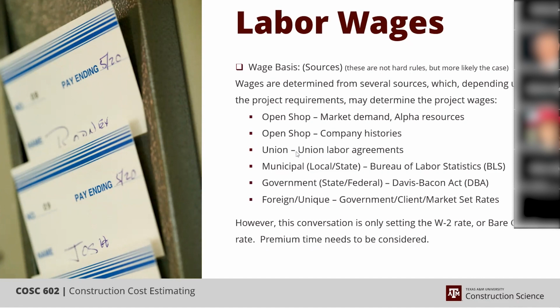And then when you go foreign, you have some really unique jobs. I've seen governments dictate wage rates. I've seen the client itself dictate wage rates, or I've seen the market take over, and it depends on what the market's demanding. So, government will trump the client and the market, and the client can trump the market if they so desire. Particularly if they both are saying something higher. If they're saying something lower, the market tends to overstep them, because you won't be able to get them there if you don't. So everything we've talked about so far is the W-2 rate.